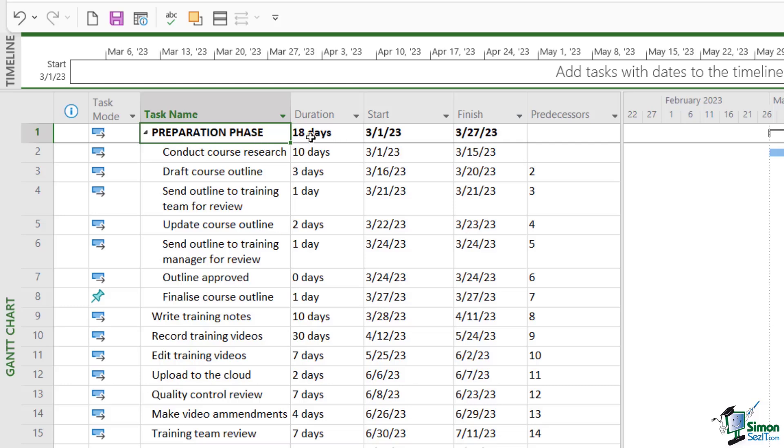And the reason why these summary tasks are quite nice is because at a glance you can see exactly how long this preparation phase is going to take. I can see it's going to take 18 days. I can see we're starting on March the 1st and the preparation phase is going to come to an end on March the 27th. So it gives you a really nice high level overview.